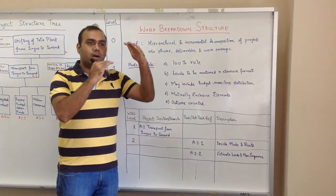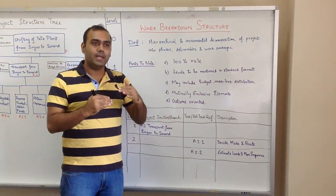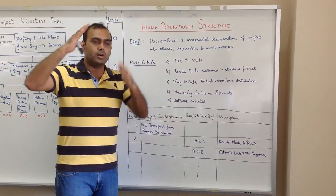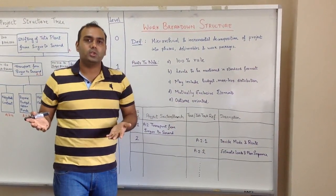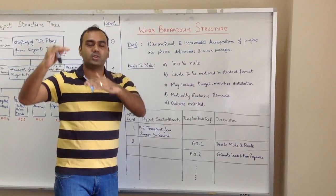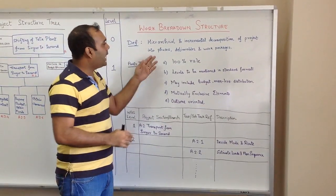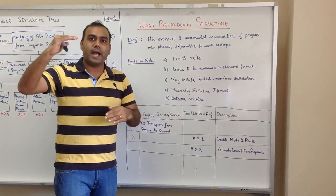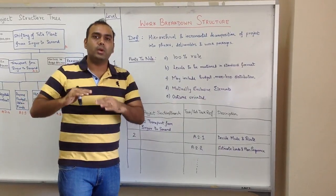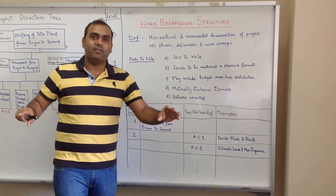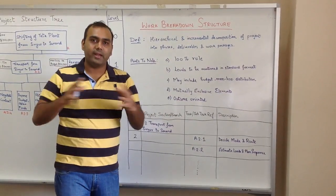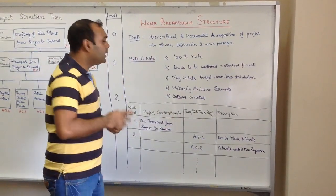Your entire work should be based on a hierarchical structure, with deliverables and sub-deliverables broken down to a level where you get all the work packages and have defined everything that is in your project.